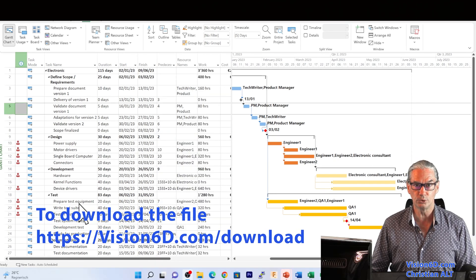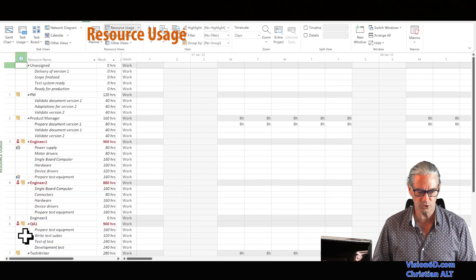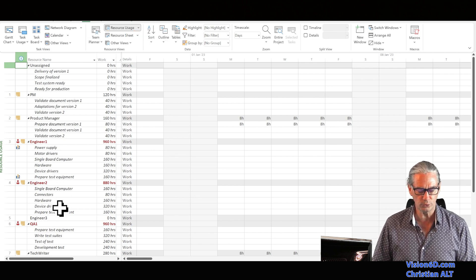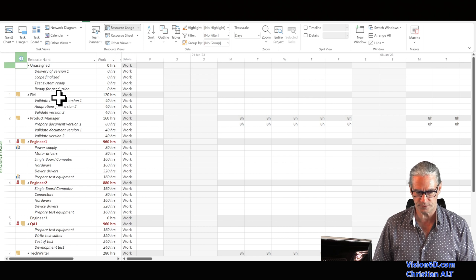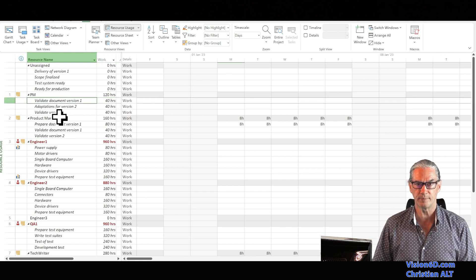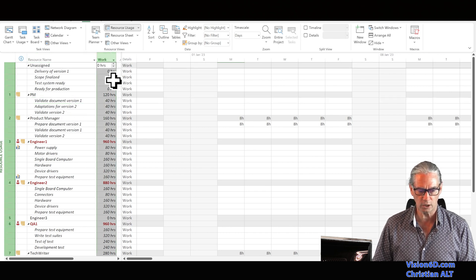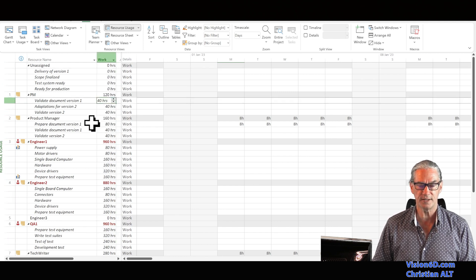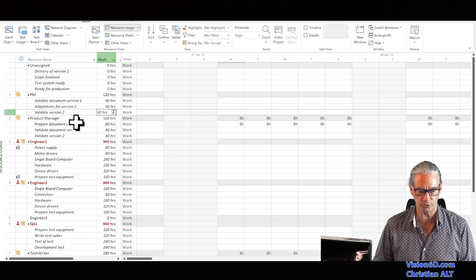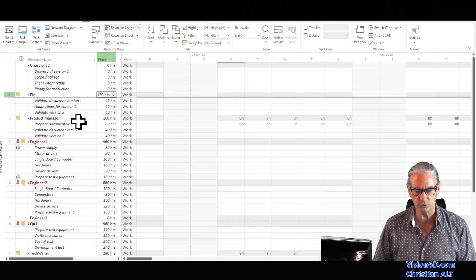We are going to use the resource usage view. I go in the left margin, right-click, and select resource usage. Here I find a new view where I find all the tasks organized by resources. Taking the first resource — the PM, the project manager — we see the PM is involved in three tasks: validate document version one, adaptation for version two, and validate version two. The work column shows 40 hours for each task, making a total of 120 hours for the PM.